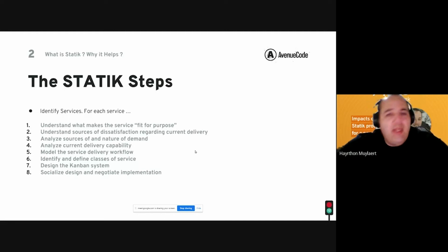I don't know if you know about the KMM, the Kanban Maturity Model, but when the team started, the team was at level 0 maturity, and after STATIK, in the first quarter, we already had a team at level 1 in transition to level 2. The Kanban Maturity Model has 7 levels, and each of those levels is split into consolidation and transition. And we had growth.